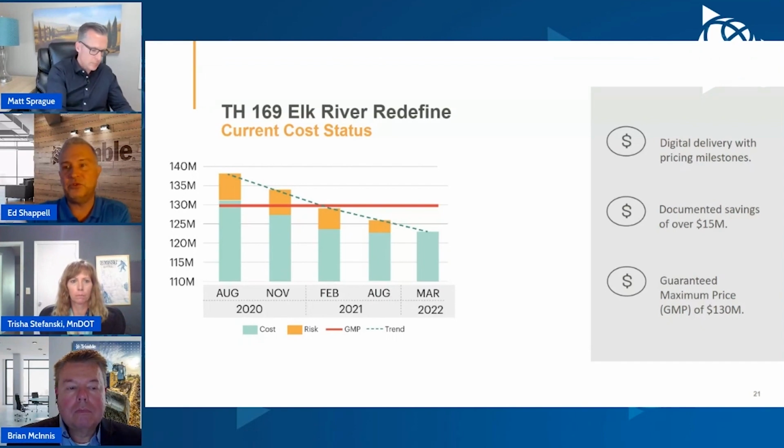The MEP or utility systems are typically a very high cost asset for an owner. That's both building and infrastructure owners, actually. So I think this is a good example where just taking that pilot step, like Trish said, using a 3D model in the design phase and doing some clash detection really yielded a lot of great results. And Trish, I would also say that just having the contractor Ames be able to provide input before construction was really valuable, right? I think they were able to give you guys a lot of good input.